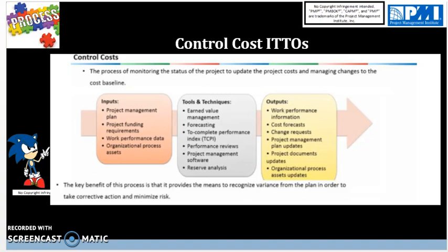Critical path method is examined to see if the longest duration path has been violated, and CPM uses single activity duration. Critical chain method is a resource constrained critical path where the team places buffers to minimize impact to schedule and cost and still meet the schedule and cost baselines.